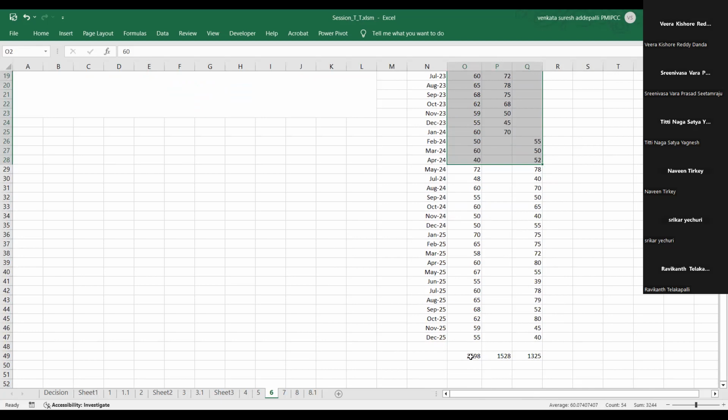And I'm already showing all the data. All I'm looking for is how would you represent this pictorially? Here your plan is 2698. You have already spent so far 1528. You are expecting to spend another 1325. If you just sum these two, what is spent so far and what is expected to be spent, it's 2853. But I would need your help to show this pictorially.